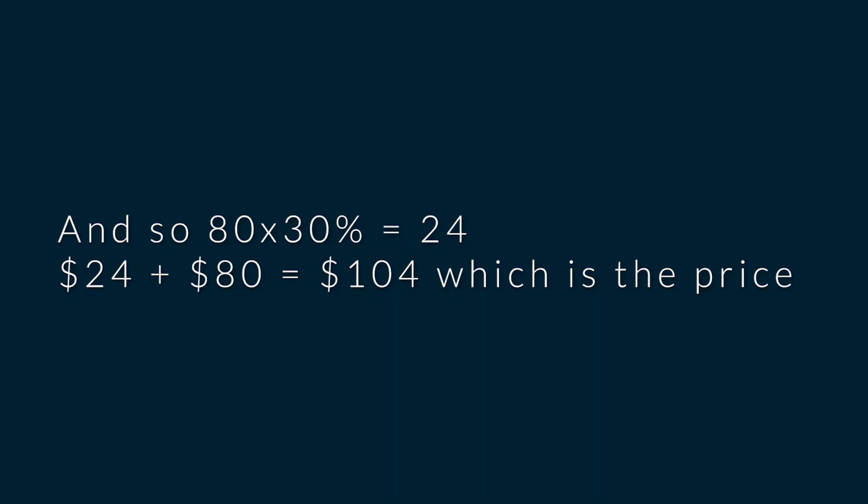Now let's assume that this supplier has a 30% markup, so that you understand this from a practical angle. That 30% is probably a result of the internal rate of return. It's a decision they made in the company. So 30%, that's their markup. That will mean 30% of the 80, which was their total cost, gives you 24. So their price will be $24 plus $80, and that's 104. That becomes their price. So that is an example of cost plus